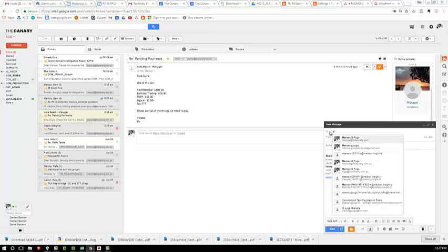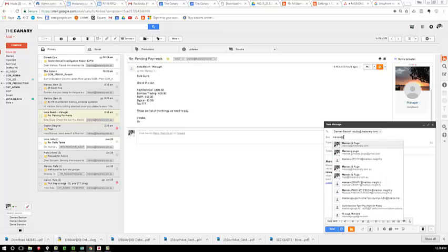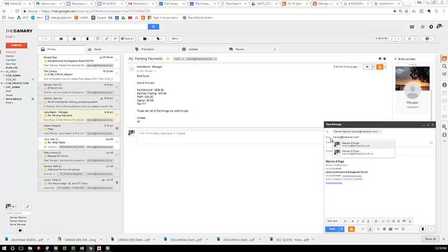No, sorry, to studio at thecanary.com, and then in BCC we add the contact list, Marcos at thecanary.com. Let's say that this was the installer of shopfront.com, whatever. We add them the information, we attach the file we were adding in the folder, and in the subject we add the project code, or in fact it's better to add the project name because the project code is meaningless for the people that are receiving the email.